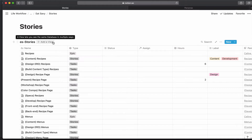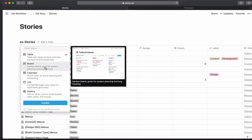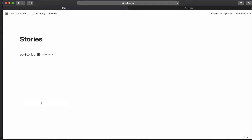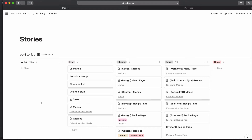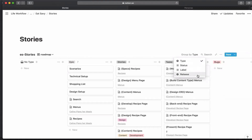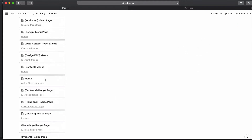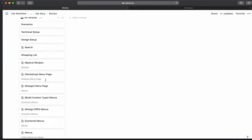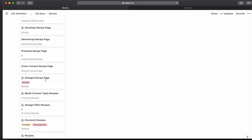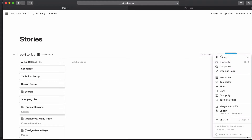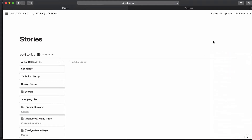Let's go ahead and create a new view. For this view, I'm going to create a board view — let's call it roadmap. I want this to be grouped by release, and everything should fall under here because that's the only release we have so far. The other thing is I don't want to see every level; I just want to see the epic level, because those are the things I'm going to be road mapping at that level. This is an important distinction.